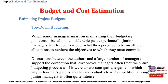Another advantage of the top-down budget process is that small yet costly tasks need not be individually identified, nor need it be feared that some small but important aspect has been overlooked. The experience and judgment of the executive is presumed automatically to factor all such elements into the overall estimate. However, questions put to subordinates indicate that senior management has a strong bias towards underestimating costs.